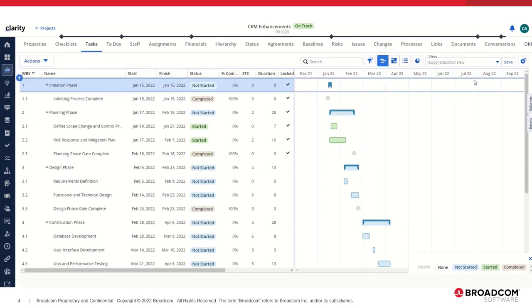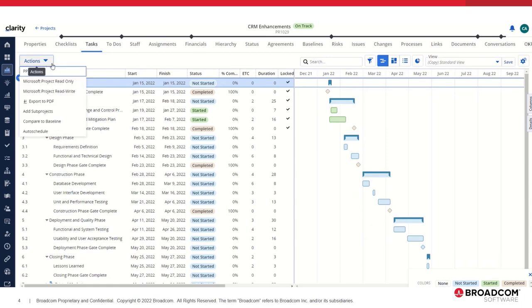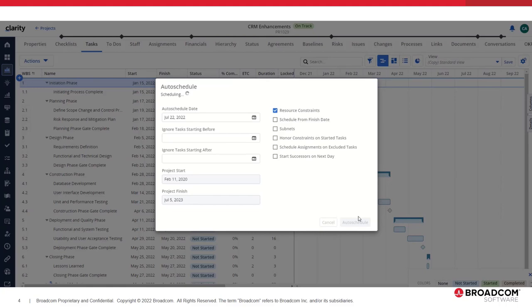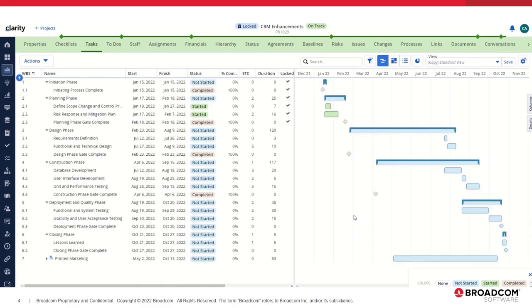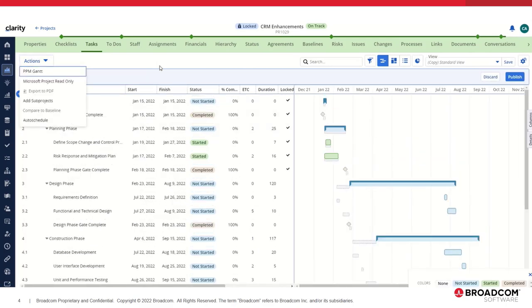If the project manager is actively using auto schedule and has put the project in a tentative schedule mode, you will see that the Export to PDF action is also disabled in this case.